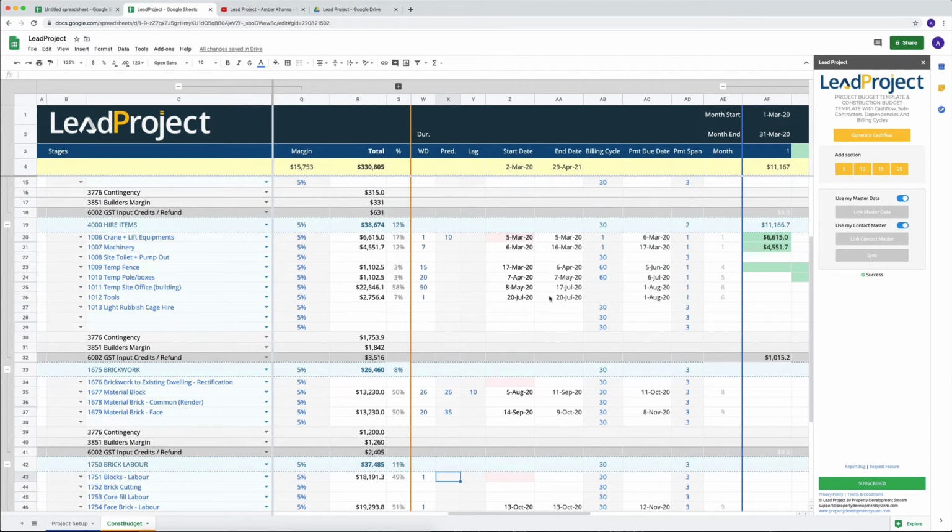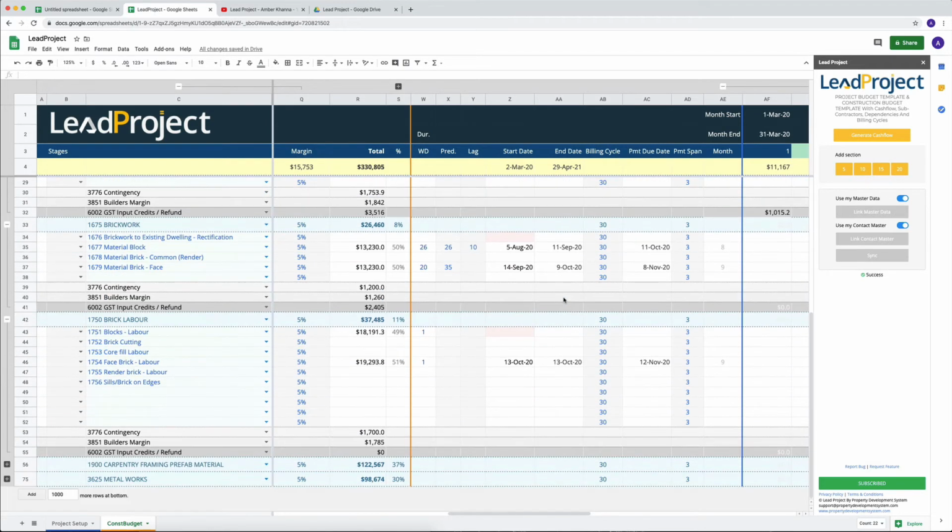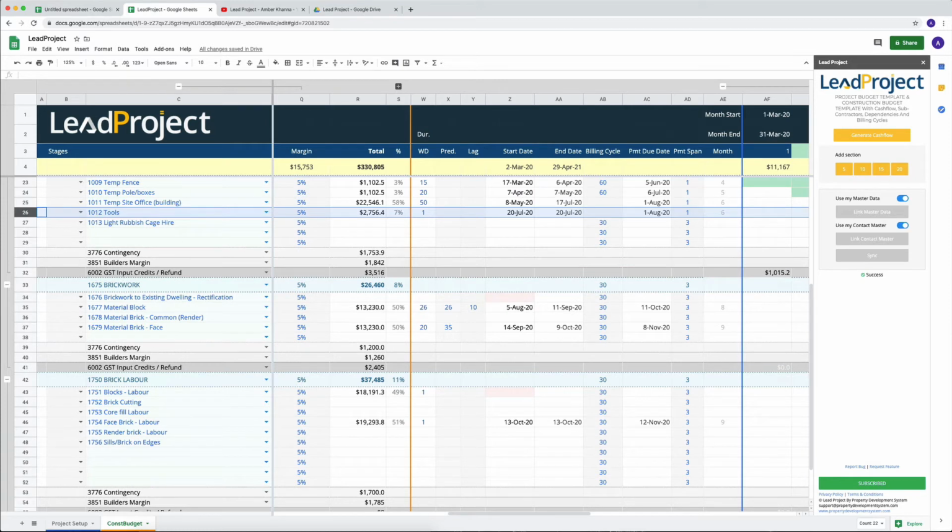Let's say we've got this task finishing on the 20th of July, and this row is 26. So if I put number 26 over here, that date will automatically get picked up, and the following date from that date onwards would automatically be adjusted, so that it assumes that after 21st July, that's the task that we are going to do.